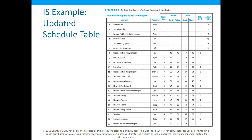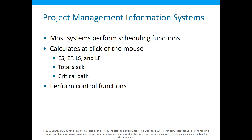Project management software calculates our early starts, late starts, total slack, and critical path. Once we start putting data in, it's that control piece. If you were using a spreadsheet, you could actually have that auto-populate and go down and affect those values as they go — instead of using just numbers, you would use formulas. These activities are all on that critical path — our critical path is fifty days. We have a little bit of slack on some of those activities, but not a lot in this particular case.